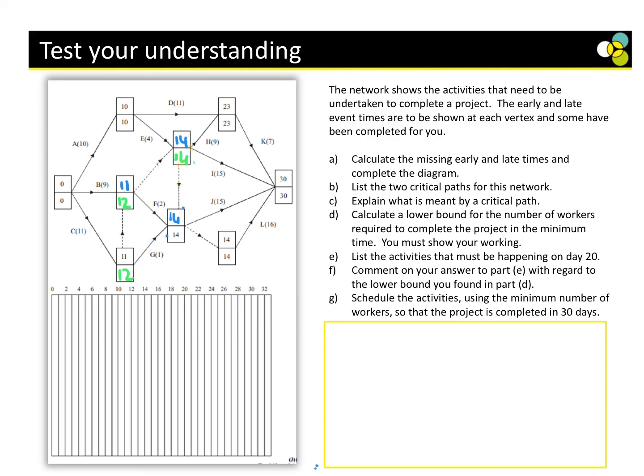Okay, here we go. So now I'm going to use yellow. So remember, even though most of the time it is between 0, 0, 10, 10, just double check that this is a critical activity, because the float will be 0. Okay, 10, 10, 0 is 0. Okay, and then 10, 4, 14, this one is 0.